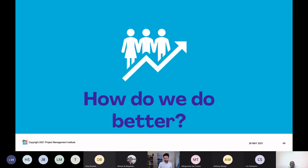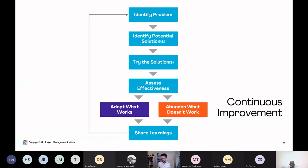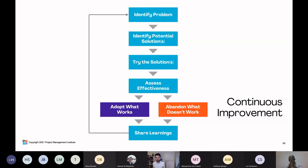Which begs the question: how do we do better? You've likely seen this loop before — the classic Kaizen loop, or plan-do-study-act, which is continuous improvement. The way it works: we identify a problem, look at potential solutions, try the solution out, assess its effectiveness, adopt what works and abandon what doesn't, share the learning inside our organization, and then loop again. That's why it's a loop and why it's continuous.